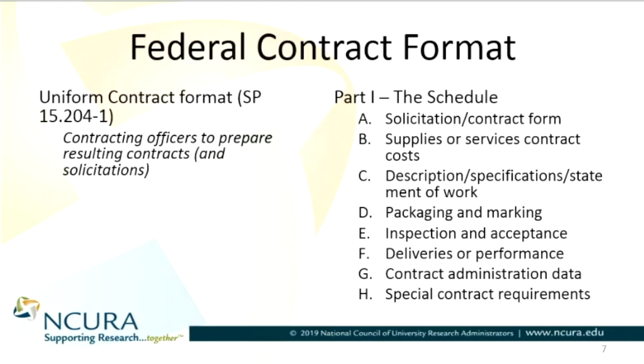This is so helpful, Angela, because when you see this, as a departmental research administrator, you'll start to see that this is a little bit different in structure than a lot of our grants happen to come across. But there's also things that we have to be wary of. One of the challenges that we run into is because you're dealing with deliverables. When you've got to Section D and packaging and marking, one of the things we don't generally have when you have a grant is a deliverable that is actually something physical that would have to be packaged and delivered. But on contracts, you do.